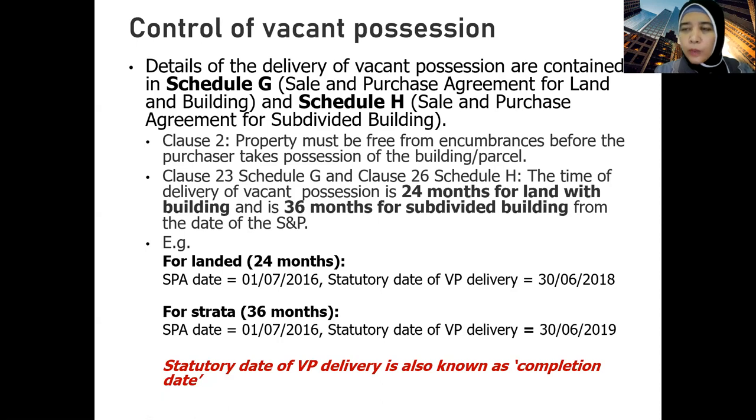And when we say the date of sale and purchase agreement, it is the date of signature, when you sign, bila disahkan, what's the stamping? That is the date of sale and purchase agreement. Now, for landed, 24 months from the date of signing of SPA, for strata, 36 months. So the SPA date for a landed property is 1st July 2016. So you calculate 24 months, which is 2 years, right? 2016 plus